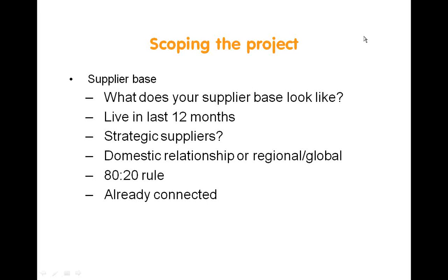Also be familiar with the suppliers that are already connected to something with you. They could already be on a P-card program, they may already be doing an ERS or self-billing program with you, they may already be connected to an EDI. Just familiarize yourself with those suppliers and consider, are they in scope or out of scope for your e-invoicing project. Similarly, if you're very close to some of your bigger suppliers, maybe they're already connected to an e-invoicing network. Again, familiarize yourself with who they're already connected to, and that really might determine who you end up selecting in the short to medium term.